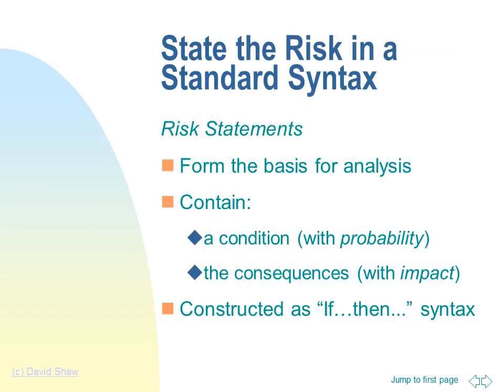As just mentioned, risk statements in a standard syntax form the basis for analysis. A statement contains a condition with its probability and the consequences with its impact. It is constructed with an if-then syntax. Let's look at an example.